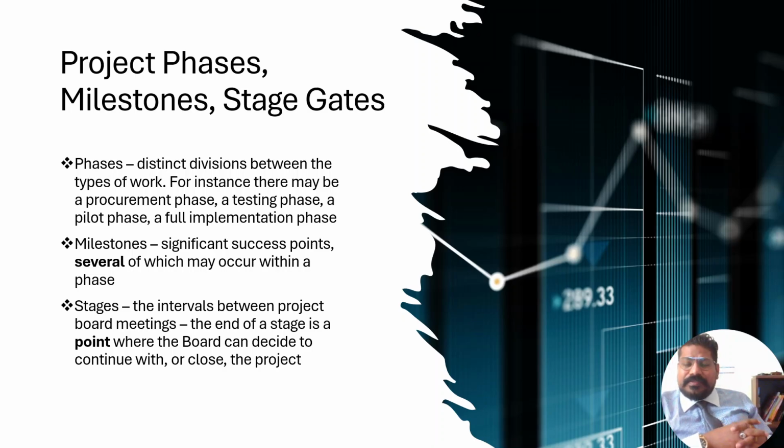Or let's say in the initiation phase there was a need, and while reaching the execution phase, 1 or 2 years have already been completed. So has this need already been met by some other product, some alternate product, or have some competitors come up with a new product? If that is the case, they need to reinvent their product by going through the ideation phase and initiation phase.